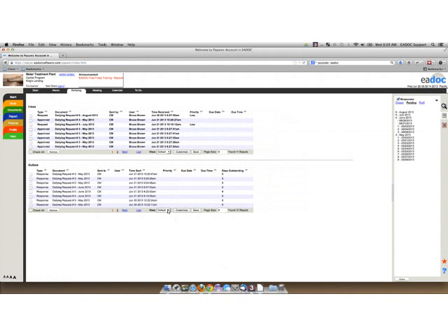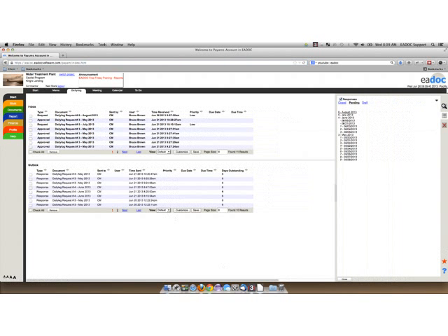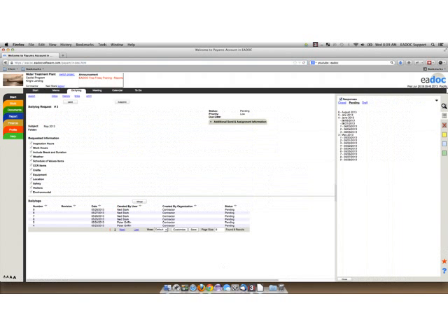You'll notice here that he does not have that New button. What that means is that he cannot create his own request. So you as a CM team, or maybe the lead inspector, somebody needs to have that New button to create that request, and then the inspector can come in and respond to that request. So he's either going to click on the link from his inbox, but he can also come over here to his browse box and click on that link there. If we were going to respond to the one we created today, we'd go with that August one, but we're going to stick with May since we've already got some in there. So he just clicks on that request, and then he has that Respond button. That allows him to respond to the daily logs.